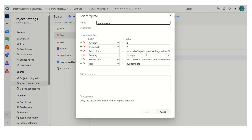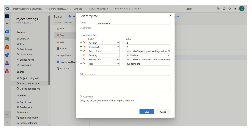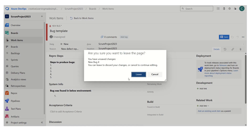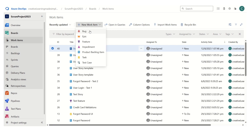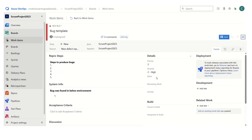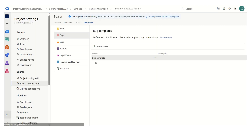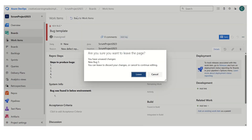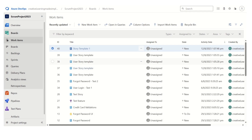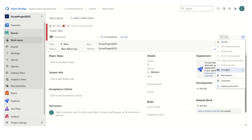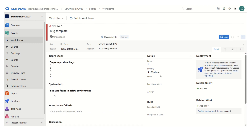If I edit here — let's say instead of severity high, I want all the severities to be logged as medium — I have saved it. Now if I close this one and go back to Work Items, if I click on bug and choose the template, I think it is still showing high. Let me see whether it has saved. If I click on edit — okay, this is medium. Maybe I need to refresh. And if I click on new bug and select the bug template, you can see now it is taking medium.